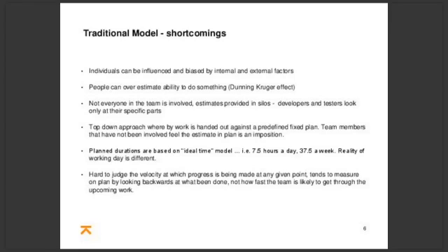And we're no doubt all familiar with the Gantt plan. Again, these can be problematic. They tend to focus on what's been done rather than what's coming up. They tend to talk in terms of percentage complete, looking backwards, but offer no insight into how fast you did a task, or what's going to happen going forward and how quickly you might get through your next set of tasks. And so there's no real indication whether the dates you've applied to the upcoming work are going to be met.